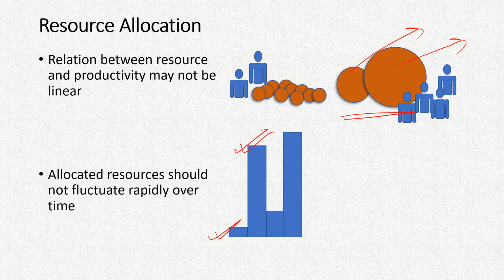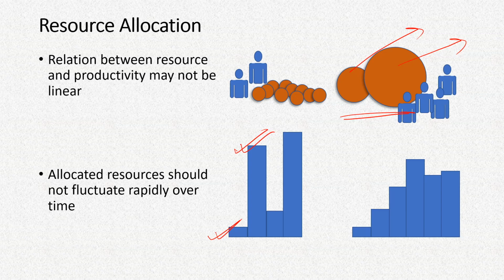So if you have, suppose, a mess running for the food, or the nearby stalls will be able to accommodate 20 or 30 workers on one day, and suddenly one day you bring in 100 workers, they will not be able to get their food on time. There will be problems regarding sanitation, urinals, and so on.